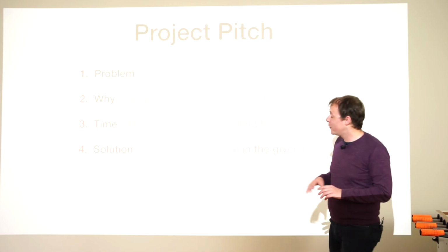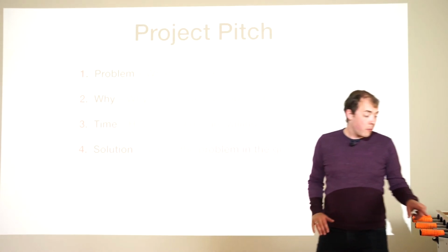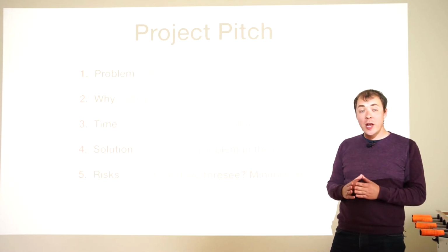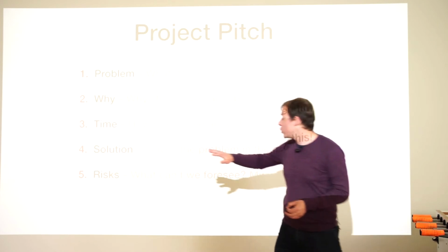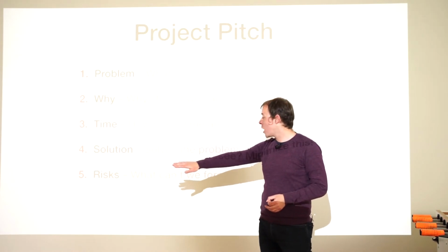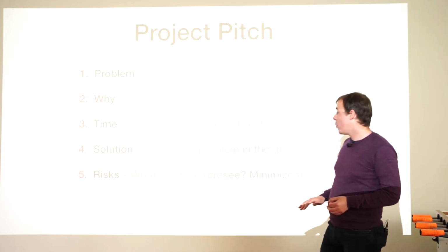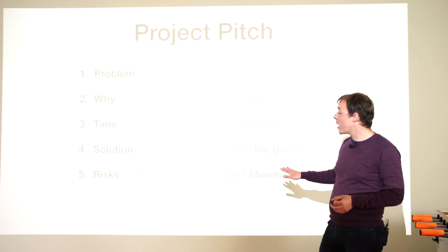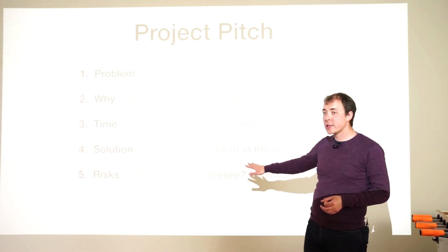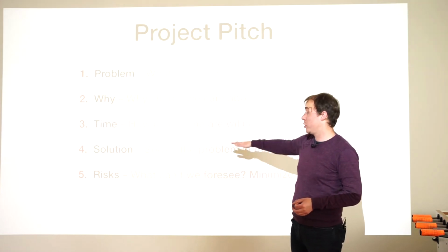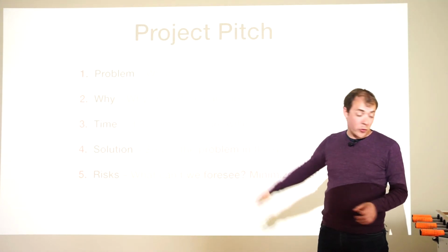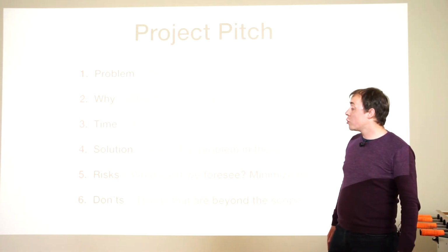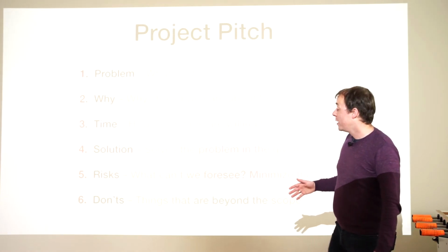So, and when we have the solution, what we always need to talk about as well is risks. Where are the challenges in the solution? What part of the solution don't we know yet? How much risk are we willing to take? What can't we foresee? And shouldn't we try to minimize this? Shouldn't we try to answer those questions first before we tackle the project? Is it a calculated risk? What can't we know?